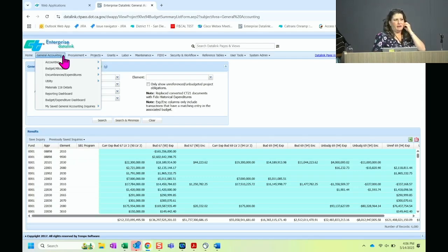I feel like what's happening with that one, and it's been a long time since I've researched it, but what I remember is when you use the QRG to do an RQS, to do an encumbrance, originally it starts out as 0048. And then when it goes through the funding profile, it changes to the correct fund.